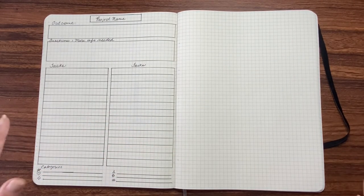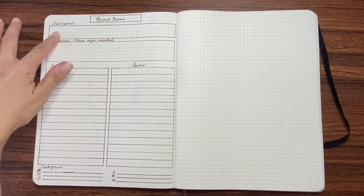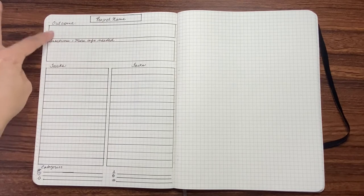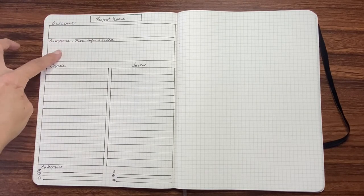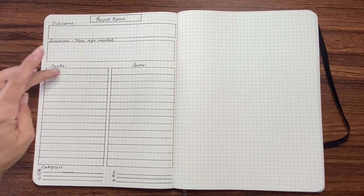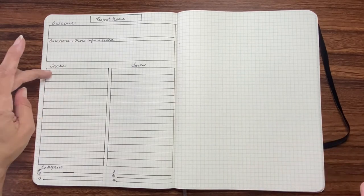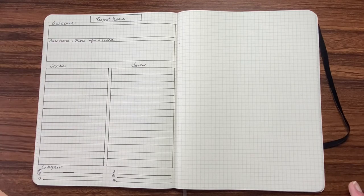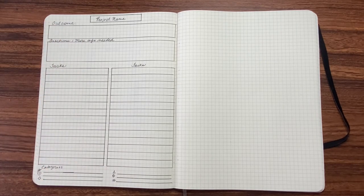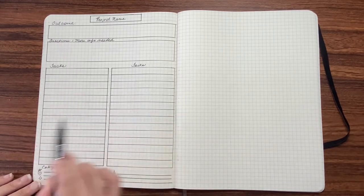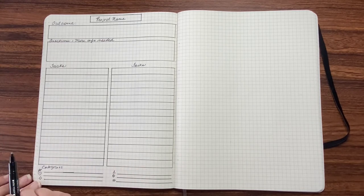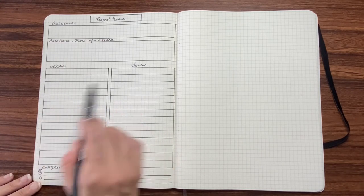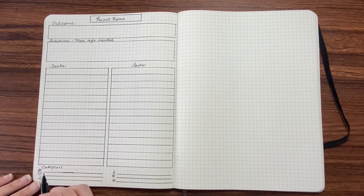Okay, so the whole idea with this side is writing the project name, what's the outcome that you want to have. So if you're remodeling a kitchen, what is the outcome of that remodel that you want to have happen? And then what are the questions or more information needed for that remodel? And then I went ahead and made this a larger space for writing space. But the idea is to now, okay, I'm just going to free write everything that I need to get done in order to complete this project. I'm not going to really think about order, I'm not going to think about category yet, write everything down. And then break things into categories and using symbols.